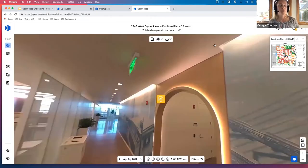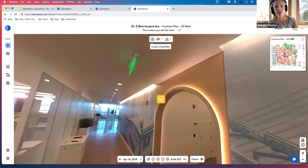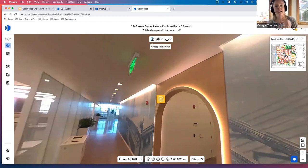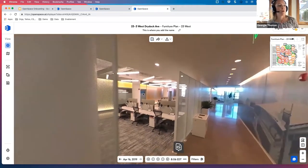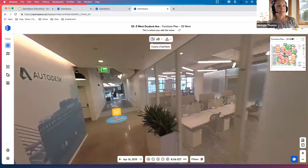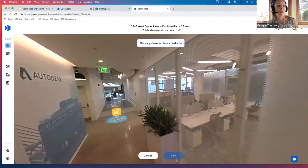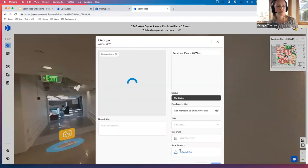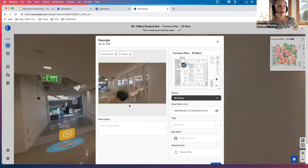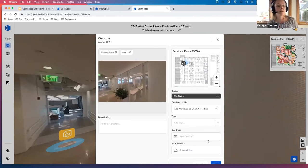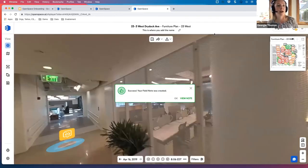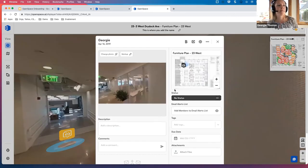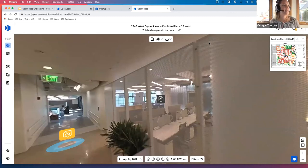So you can take a field note directly on site, or you can also take a field note behind your computer. This is great for folks in the office who really just want visibility and have questions on specific items. So to take a field note, you can simply press this plus sign top corner, and wherever you select, it will take a field note, take a screenshot, and then you can add in a description, give it a status, due date, attachments. You can even mark it up and swap out your photos. Click save, and then it will save right away. Field notes are fantastic. Really great collaborative tool.